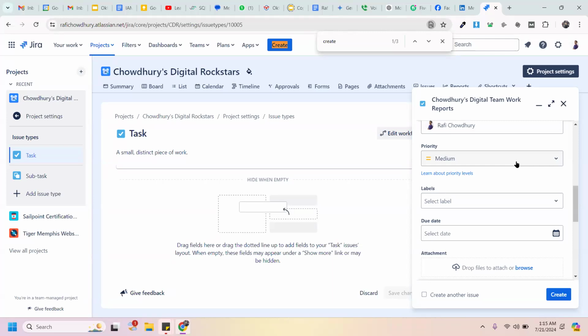So priority is basically where you define the priority of your task, how you want to categorize it. If there are, say, hundreds of tasks, or loads of tasks, you may have to define this priority so that, if there are 10 items under your name, you can categorize them into different priorities. Then in daily stand-ups or scrum ceremonies, you can say, I have these 10 items under me, and these are the topmost priorities that have been given to me. So I'm working on these three tickets or two tickets.